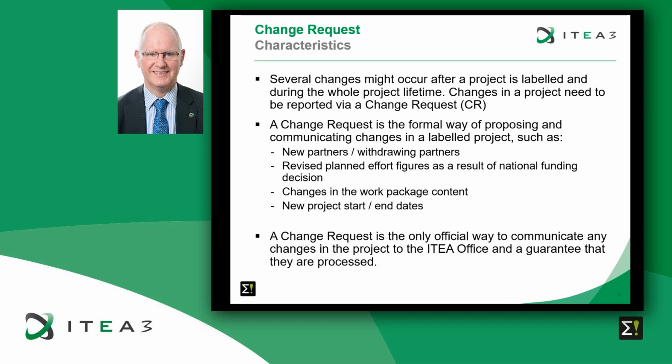We want to emphasize here that the change request is the only official way to communicate any changes in the project to the ITEA office and a guarantee that they are processed. We do not accept any other means of reporting changes into a project, so don't send us any emails because we do not process these kinds of things.